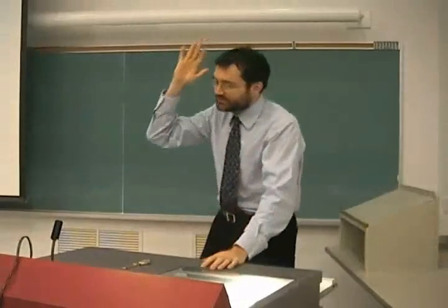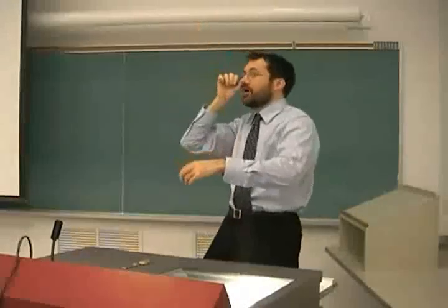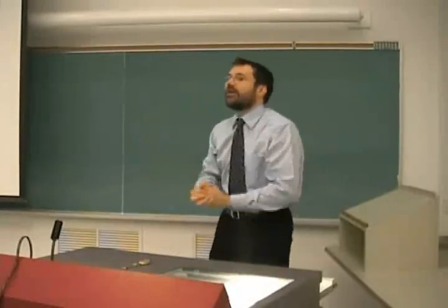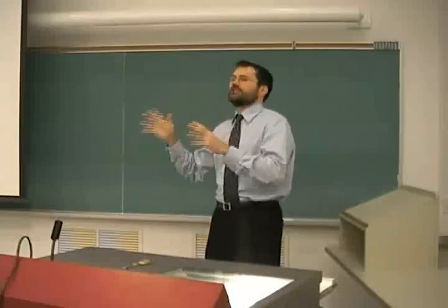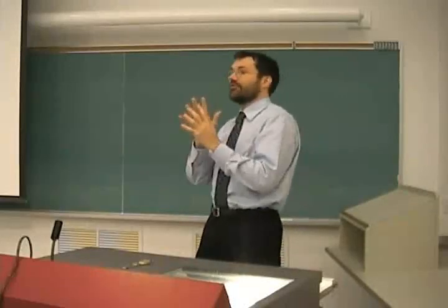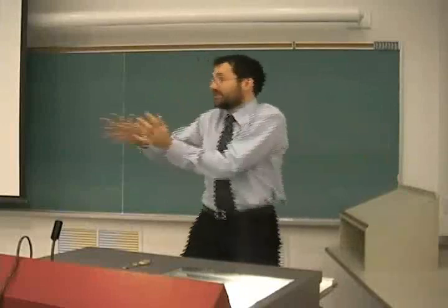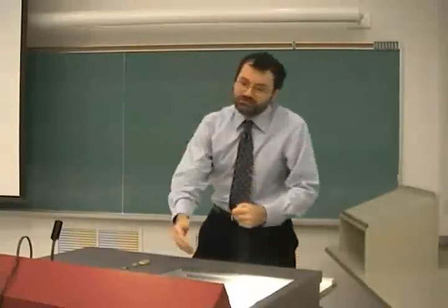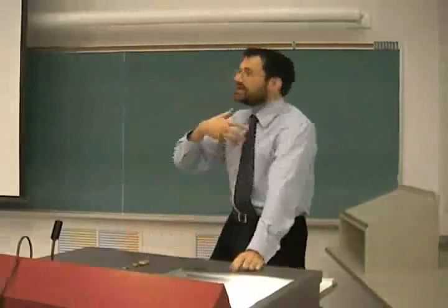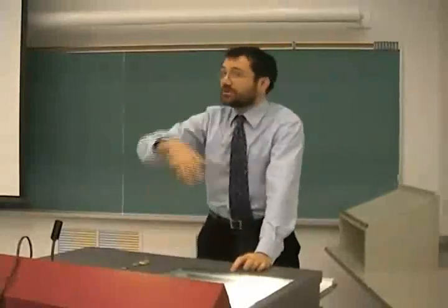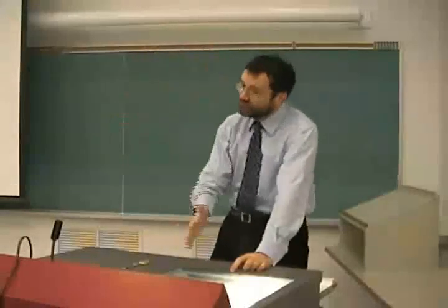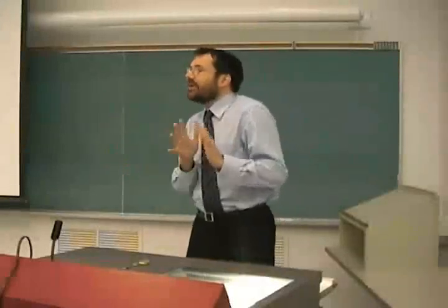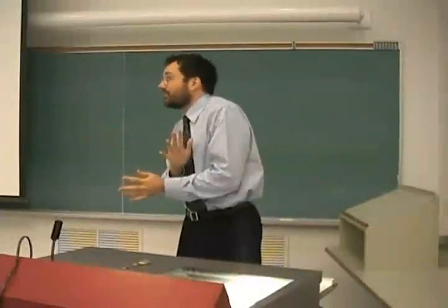We have an estimate that says we'll deliver in 5 months. At 4.5 months, you come along to the customer, the customer thinks it's going to be 2 weeks away, and you say, oh, by the way, new estimate, another 5 months. Well, that looks really horrible to the customer, because the customer thinks that you've done nothing. It was 5 months originally, now it's still 5 months. So you've doubled your estimate because a whole bunch of things went wrong. But if you've been telling the customer all along, initially here were some risks we anticipated, and some of the risks didn't come up, some of them did, and you have to extend your deadline, and you tell them that every week, they still won't like it, but it's a heck of a lot better than suddenly announcing at the last minute that, by the way, they're not going to get what they expect. Okay?